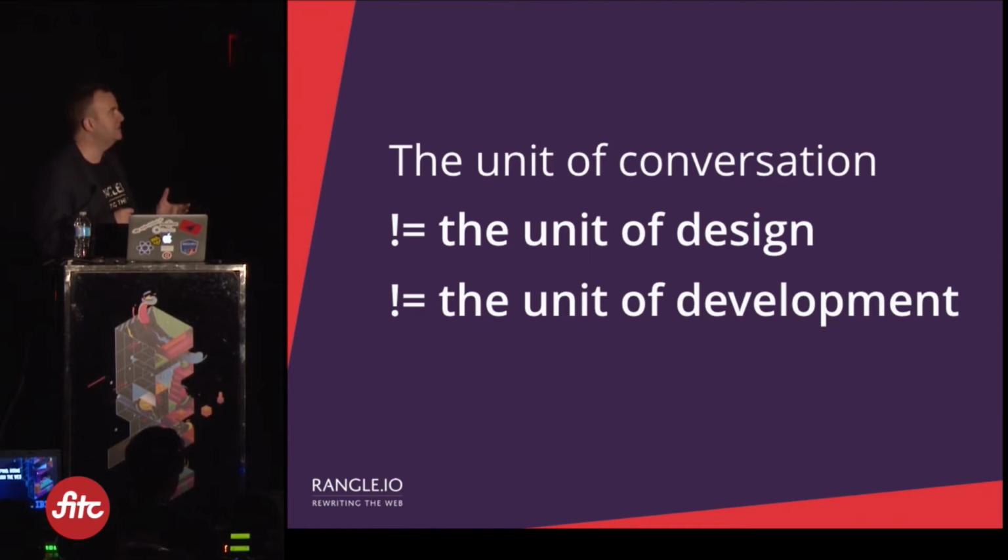So what Lean UX does is it allows you to maintain a conversation on a specific unit of value, and you're starting with what's the hypothesis, what are we trying to do, you're designing to that. And the way you account for some of the other goals of UX and design is you build out the theory and the hypothesis and the style guides. And everything that you can factor out of the screens, you can put in a separate package. You have sign-off on the look and the feel. You have sign-off on the colors. And now you're moving into development, and you can pick specific things.